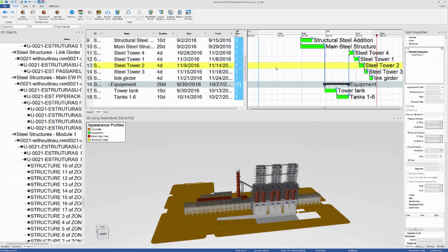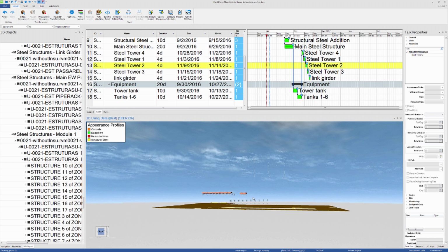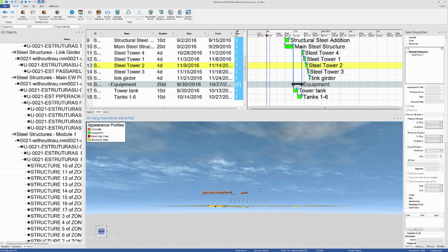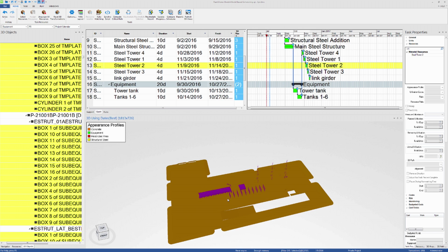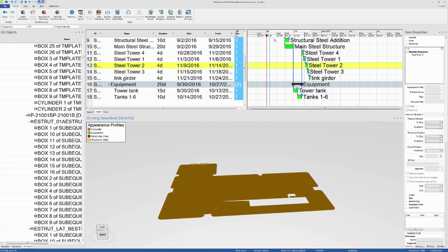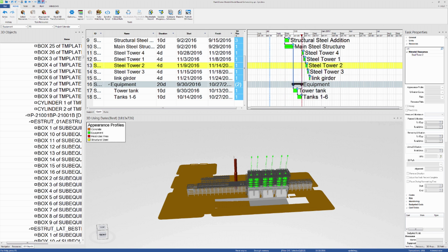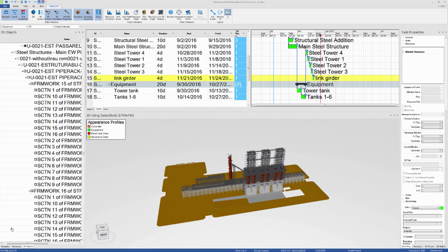When creating a high-level sequencing schedule, you may want to leave out some of the resources that you do not consider critical at this early stage of the project planning. At this stage, it's okay to unload these resources from our project to bring them back at a later stage when more detail is required. Let's review our current sequence by slowly dragging the focus time through the Gantt chart. It looks like we're now ready to add some basic cost estimates to our high-level schedule.